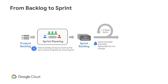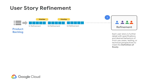One area of confusion is what happens in between the steps from product backlog to finished work. The ceremonies are fairly easy to understand, but the sequence can be tricky to visualize. Taking another view sprint by sprint, you will see a repeating pattern where the product backlog items are refined prior to the start of development — this repeating effort is called backlog refinement. A team process established at the beginning of the project is called the definition of ready. This checklist is the agreement within the team of when each story is refined enough for developers and QA engineers to start the sprint.